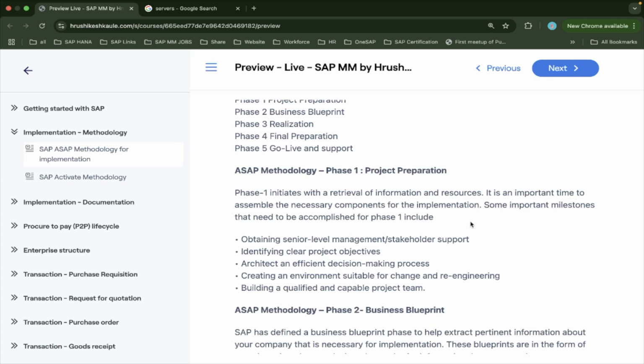Once that is done, you will have the quotations, how much cost each vendor is giving you for implementation. On that basis, you will select on technical and budget criteria. Also the timeline, in how many months they are going to implement. With multiple criteria, you will select one vendor.